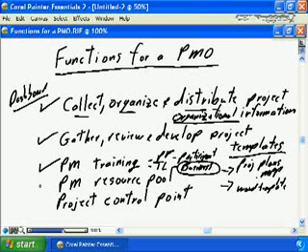training. As mentioned previously, a common requirement, a common focus for PMOs is the actual resource pool. All project management staff, whether they be actual project managers, team leaders, project coordinators, are responsible to report into the PMO. And then when a business unit wants to sponsor a project, they would come to the PMO and say, I need a project manager, I need a team leader, and the PMO would staff out, assign the project manager to the business unit from this qualified, trained resource pool.